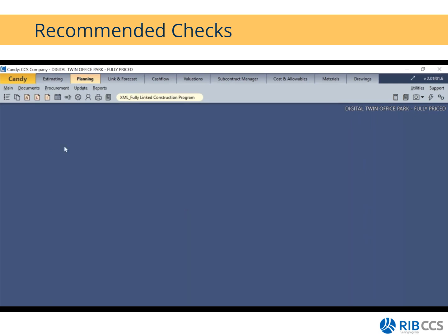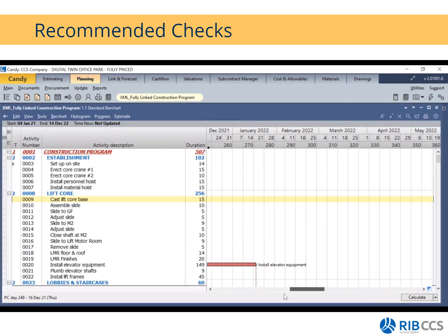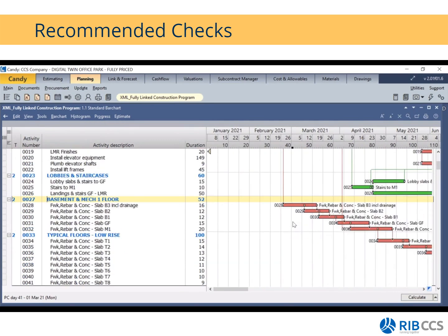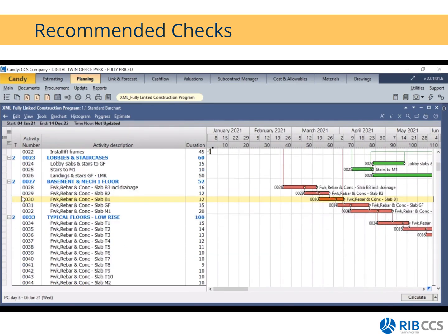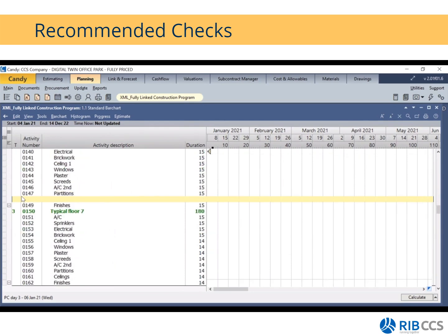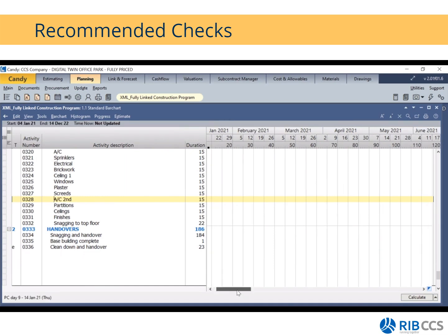It's just that now I made sure that I fix all the links. So if I just scroll through it quickly, you'll see that there are no B-typed activities alongside my activities, and if I go all the way down, you'll also note that I have introduced an E-type activity, meaning that this is my contractual end.